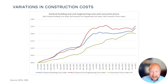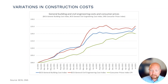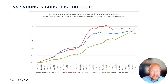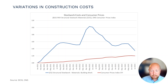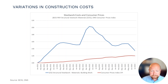Looking at a couple of BCIS indices plotted against the CPI from January 2021, we can really see how general inflation and movement in construction costs have differed. If you had entered a 24-month contract in February 2021, there were months in that two-year period when the difference between CPI and civil engineering cost increases was over 11 percent, and the difference between CPI and building cost increases was over 7 percent. For particularly volatile resources the difference can be even more significant — there were months when steelwork had increased 80 percent more than CPI. If you're using indices like CPI or RPI to inflate your construction costs, I would strongly recommend watching our recent webinars on using the right index to manage inflationary risk.